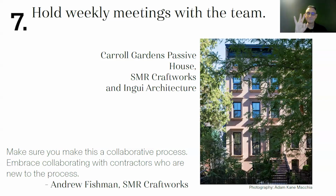The same three boring questions: What did you do last week? What do you plan to do this week? And what do you need from anybody over the next two weeks? If you do that, your job will stay on track. Your project will stay on track.